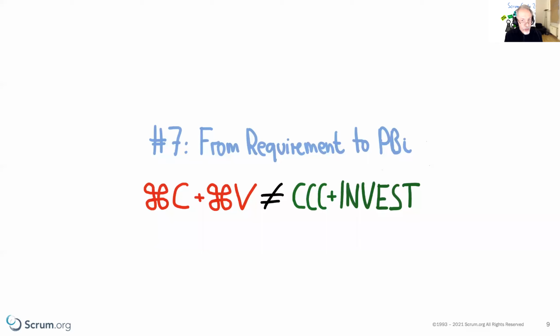So what I always do if I have a look at a new product backlog, I try to figure out those things that were simply created by copying and pasting content from other documents. This always means that there was no discussion among the team. There could be problems at a later stage. We certainly run into them during sprint planning, or worse, during the sprint when we try to work on them. So you look for copy and paste product backlog items.